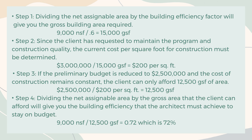Step 3: If the preliminary budget is reduced to $2,500,000 and the cost of construction remains constant, the client can only afford 12,500 gross square feet. $2,500,000 divided by $200 per square foot equals 12,500 gross square feet. Step 4: Dividing the net assignable area by the gross area the client can afford gives the building efficiency the architect must achieve to stay on budget. 9,000 net square feet divided by 12,500 gross square feet equals 0.72, which is 72%.